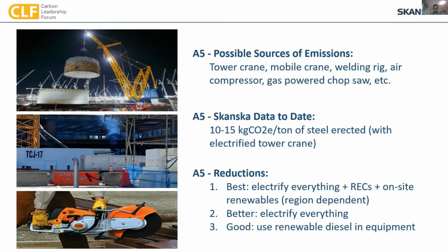Because otherwise, that middle photo is an actual picture from a job site recently where our erector had to roll out this giant diesel rig to power their welding operation. It's things like that where we walk on site and see that, and we go, okay, we need to get this into our RFPs and bid packages so that we address this. What happened here was, like a lot of things, no one thinks about it until our steel erector is about to show up on site in a week. And by that time, it's too late to do anything about it.